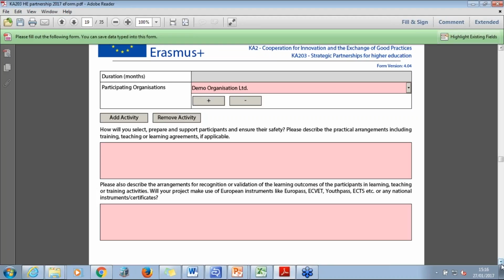Preparation could include activities such as linguistic training, virtual mentoring, and/or collaboration with partner schools, partner organisations, briefings, pre-departure assessments, or domestic training. You should outline the risks you identify in this project in relation to task, participants, location, as well as your plans for mitigating these risks to ensure the safety of all involved. In this section of the application, you should also discuss your organisation's emergency procedures and a code of behaviour for participants. Please also provide evidence of your plans for obtaining suitable insurance for participants and managing any additional visa requirements and legal aspects too.